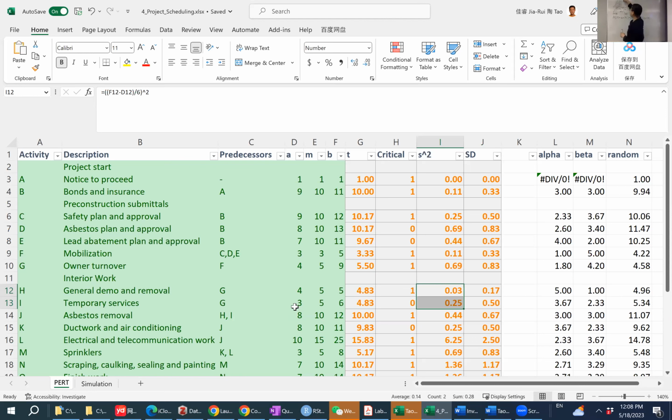Okay, now with this done, you should also have a sense of how we can calculate the area that's to the right of it. In a Z table, we are always given the area that's to the left side of the curve, right? If we are asked about the right side of the curve, of course, we need to make some adjustment by recognizing that the total area is 1, right? So using that knowledge, we can calculate the probability that this total duration is greater than 95.